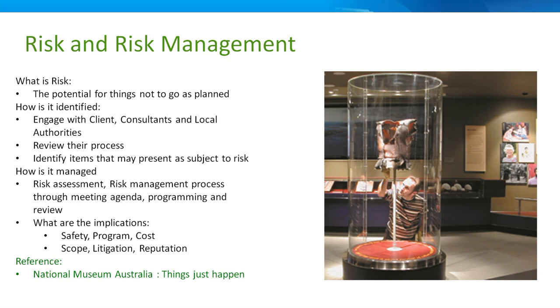And we've still got an end date of January the 1st because there's a preschool and all the kids are booked in. So everything was solved about 2 months ago, and we rang everyone and said, well, we've got it solved, how's it going? Oh, it's all gone cold, we're on other things. And so we spent a week talking with everyone, and on all our emails it's got drop dead construction date 15th of December, and we had to get people on board and actually get them motivated.